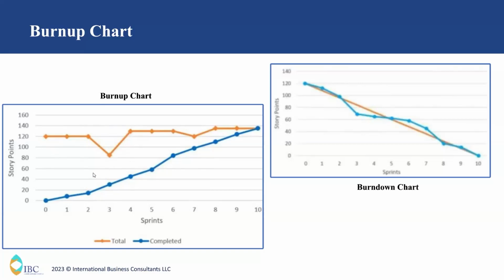Now we can answer his question. How does it reflect in the burn down chart? If you see here, by sprint 3, suddenly we can see there is a huge work committed. So the team committed a lot of work. How does a team commit a lot of work? It is not because the team completed a few works. It is not because of that reason. Some scope is removed. That's why the chart is going below. Does it answer your question?